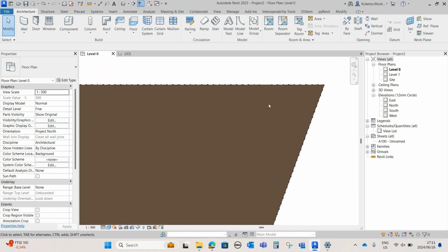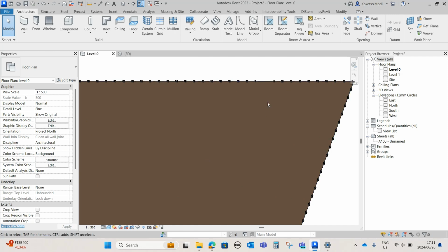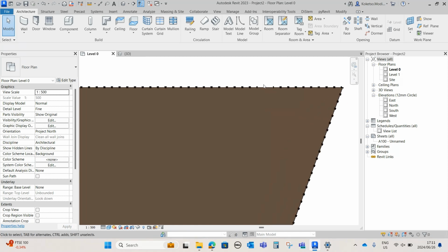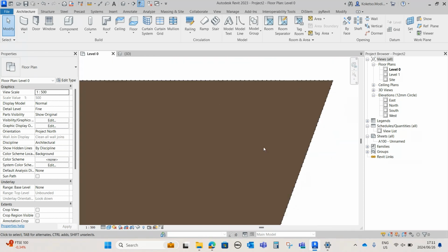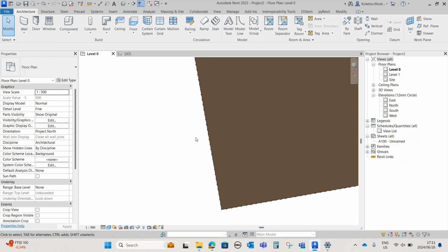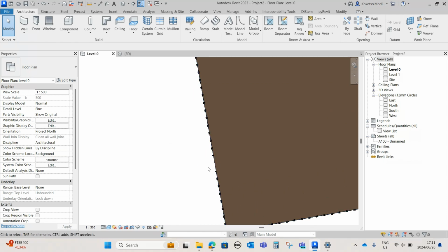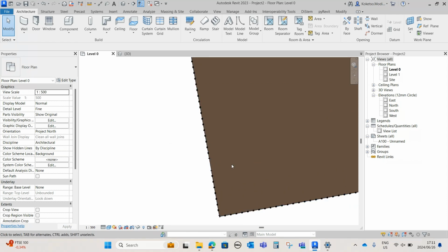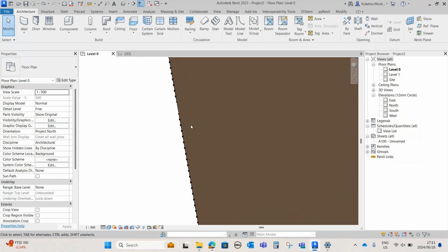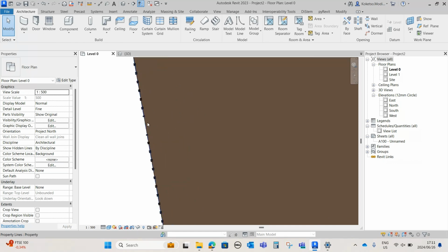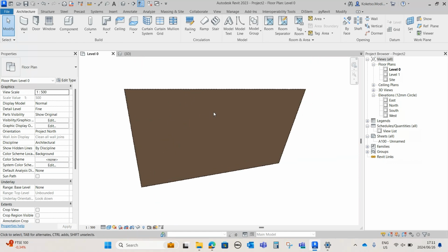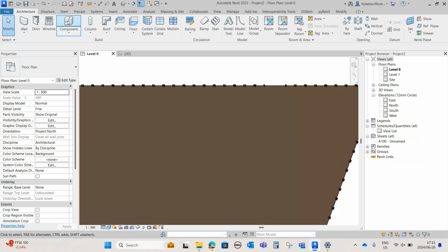So we're gonna have three access points. So this side is basically the main entrance, where mostly the engineers will enter and head to their site offices and also the assembly point. So this side is mostly for the construction plants like the concrete mixers and also the other trucks that deliver the material to the construction site, and also the general workers also. And so okay, now it's time to model our gravel walkways and also our gravel roads.